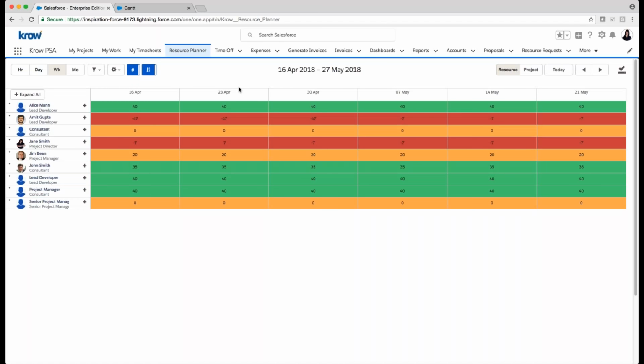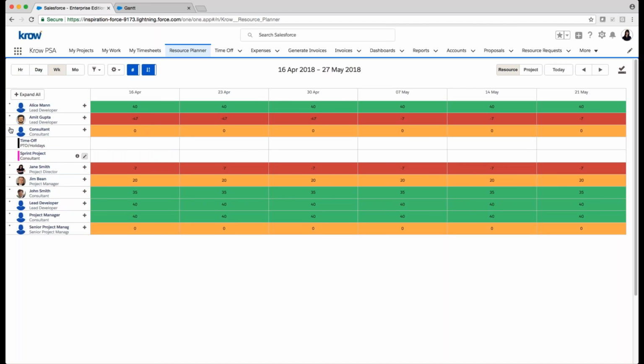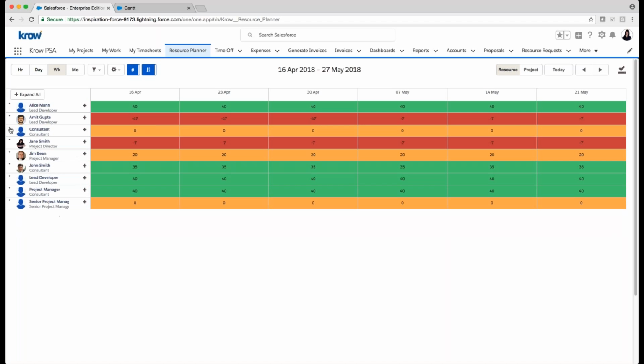You might be more interested in availability. So I just want to see who's available. I can see who's over scheduled, so I know they're not available. I can see here this person's got 0 hours, they're under scheduled, so maybe I want to start to schedule them on projects and or tasks right from here as well. So this is called availability.